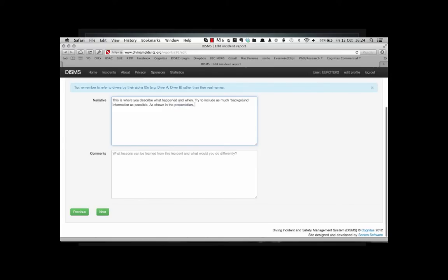two case studies, if you just said, diver had a narcosis on a rebreather and bailed out, resolved it in the shallower depths. Great. What's the lesson learned from that? You need to be able to understand it. Why did the incident occur? And what do you think your lessons learned were? What would you do differently? It's interesting what people thought the problem was versus when you start breaking it down, what really happened.